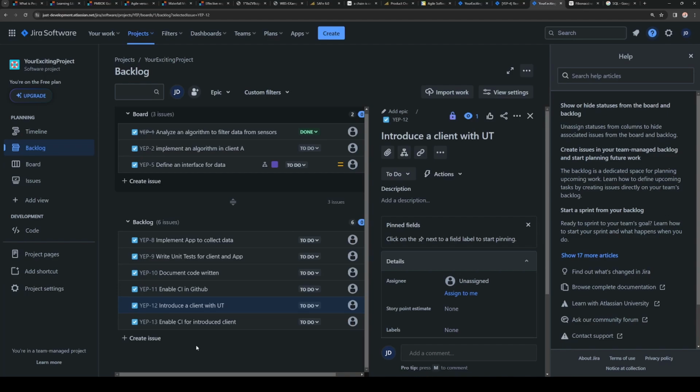So, for example, one colleague will plan the backlog to work only with the embedded part. One colleague will try to plan the work to work only with the continuous integration part. One will work only with the documentation because it's easier, and so on. And in the end, you will probably have two, three, four people who will have really deep knowledge in specific areas. And I really hope that they will not have any sick leave or vacation periods, because without them, you're in trouble. As usual, it happens that it is summertime or something happens, the key person is leaving the project, and then everyone goes crazy because no one knows the stuff like that person.